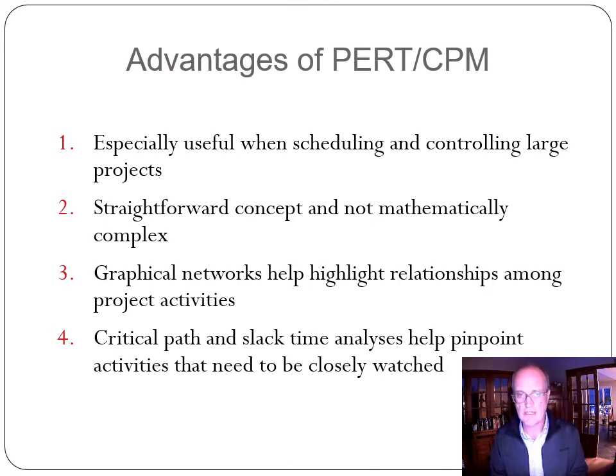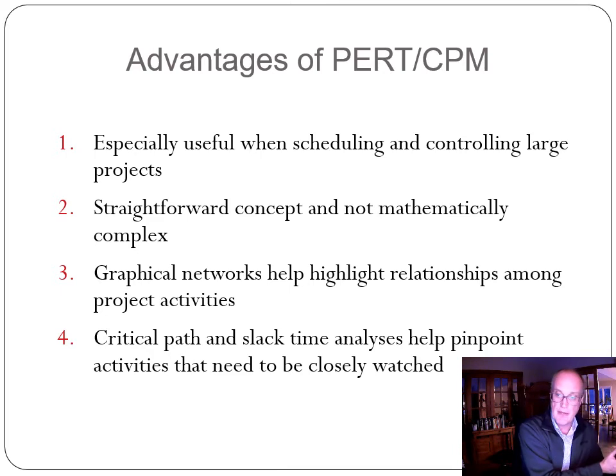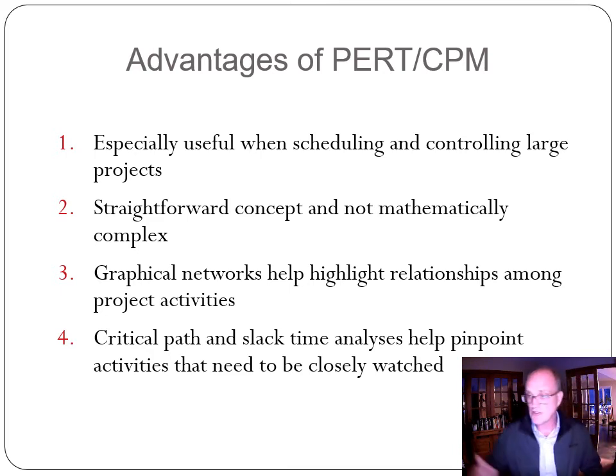As an example, we had a client who was launching a new product who hadn't incorporated the time it was going to take to order packaging. Because they didn't include that, they didn't get the design of packaging done in time. They ordered packaging, and then packaging wasn't going to arrive until well after their launch plan. So understanding these things in a variety of roles becomes critically important.